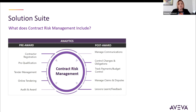During the tendering management stage, we go through the entire process of receiving a technical scope and getting bids in using the portal. We send out the RFX package, answer bid clarification questions, keep everything anonymous and secure. We have customers in nuclear and infrastructure — with strict government standards — and this system passes all of those, with everything secure, time-stamped, and auditable.